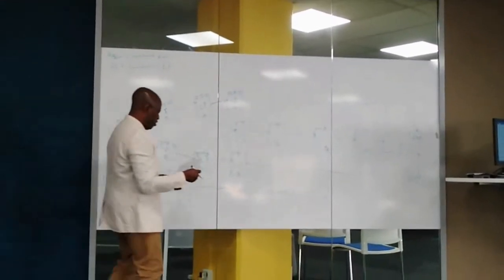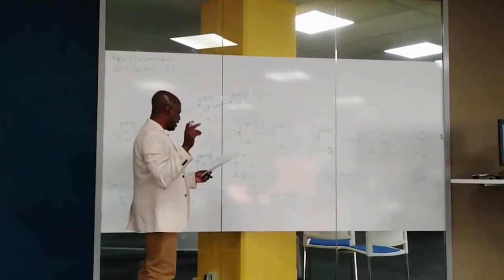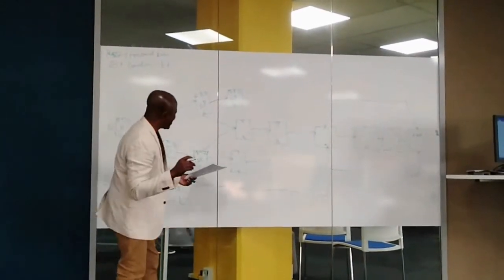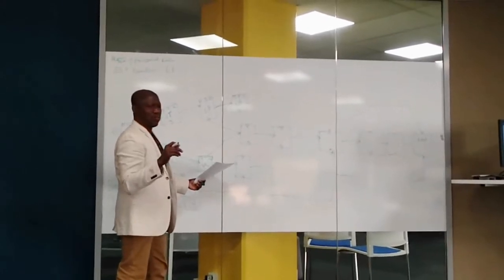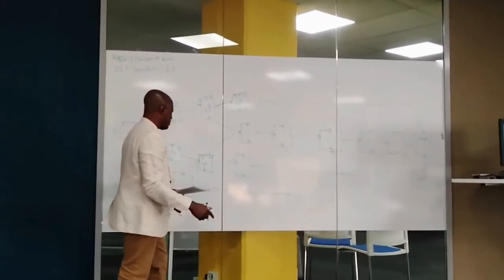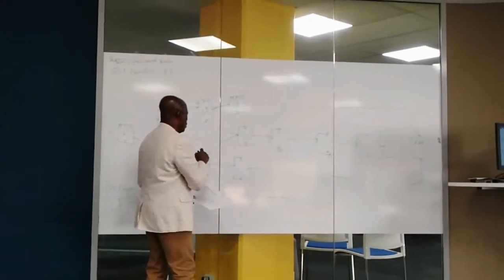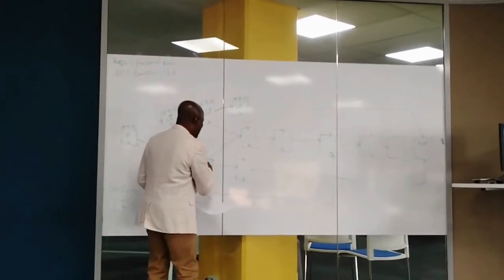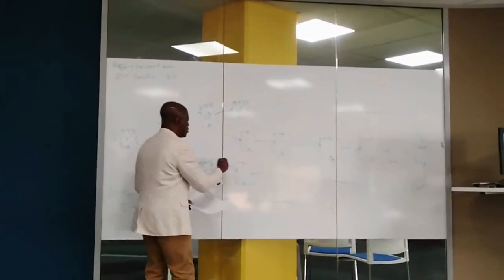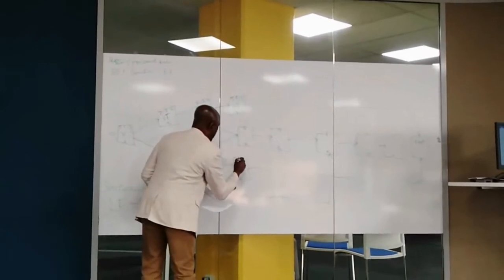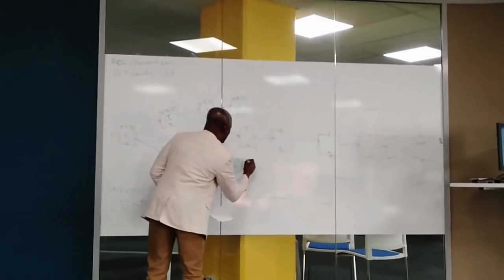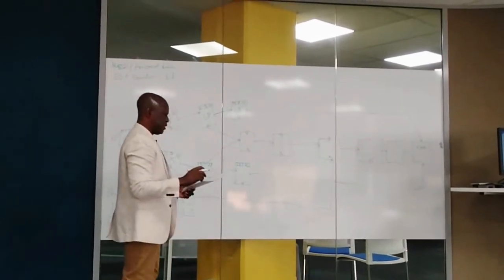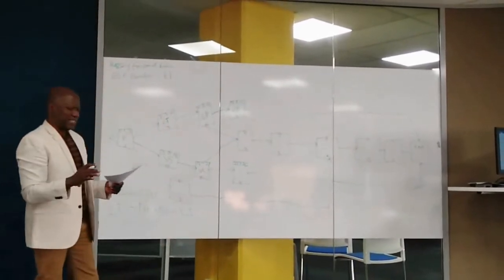Now, we have activity 7. Activity 7 will be done only when activity 6 is completed, right? So now, when we get here, we transfer 7 days here. We put it here, and with the 4 days of this, it becomes 11. Am I right? Yeah. We have completed up to activity 7.